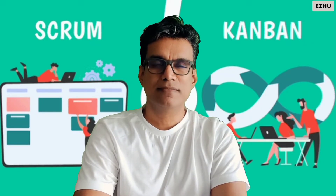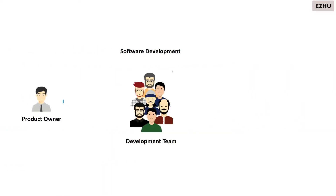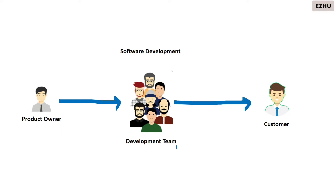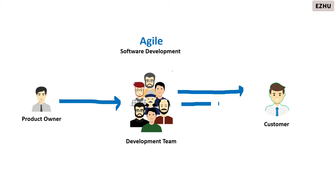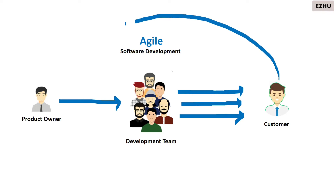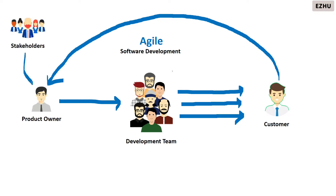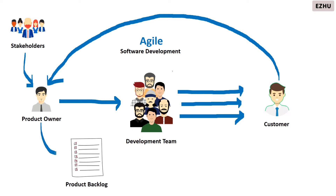In software development, the product owner defines the requirements and the development team builds the product as per the requirements and delivers to the customer. When we consider agile software development, value is delivered to the customer in the form of increments. Feedback is gathered from the customer and goes to the product owner, who consolidates the feedback, user stories, and new requirements into the product backlog, then reprioritizes the list of features for the next iteration. The scrum master forms the link between the product owner and the development team and ensures good practices are followed.